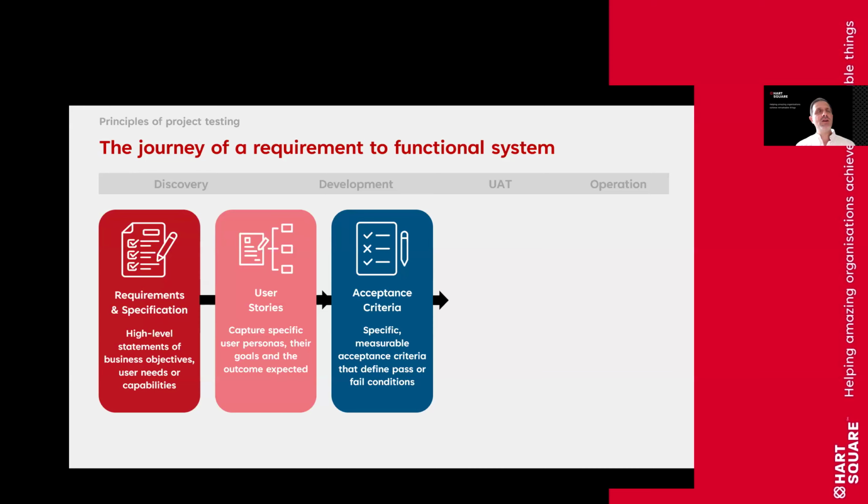So it starts relatively early. And I think if these acceptance criteria are really weeded through and understood and owned by the organization, they might be started by the technology partner, but they need to be owned by the organization and hopefully a product owner, and in my preference, a single product owner, one person who's going to understand what pass or fail looks like for the entire solution down to a granular degree.